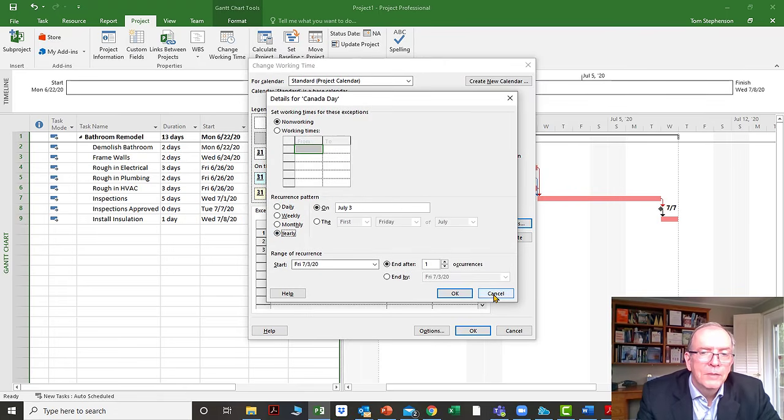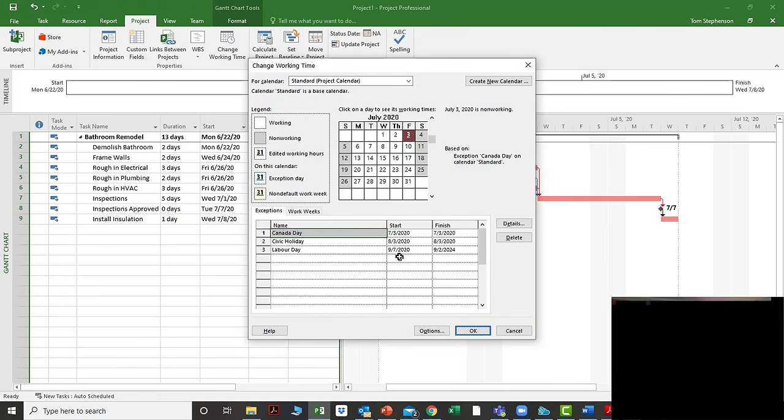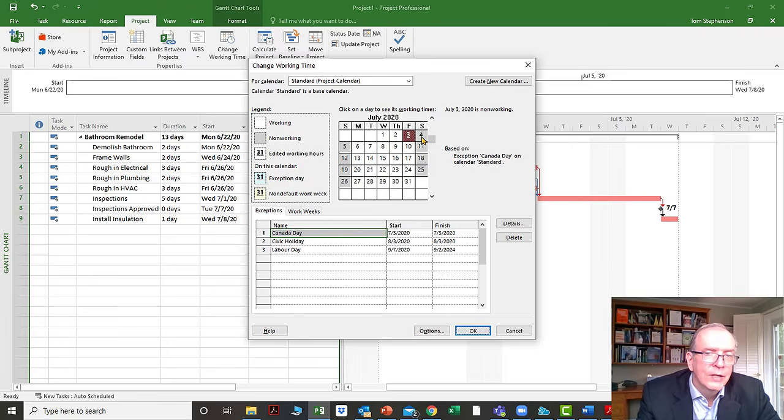The only problem is that with those ones you got to be kind of careful because they end up falling on a Saturday, and then if your company takes the Friday or the Monday off, then you got to make sure you put it in manually for those dates. You want to make sure that every day is accounted for. So you have to be a little bit careful of those kind of things that are unique for your particular business.